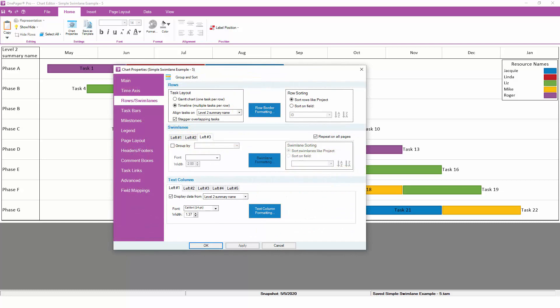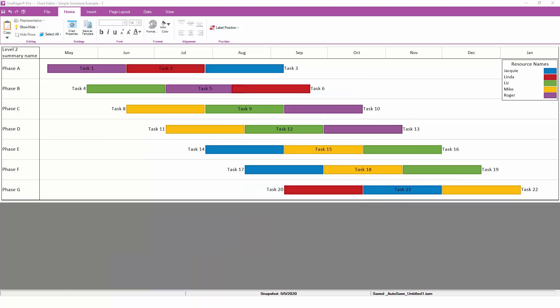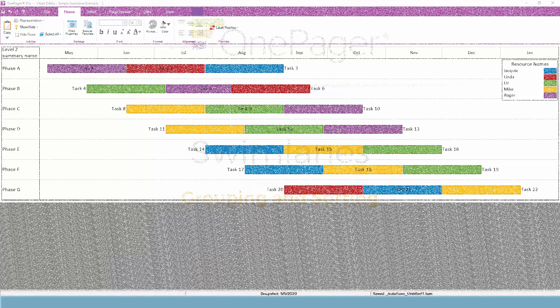When creating a timeline layout, OnePager lets you either allow or avoid overlap. If we choose not to stagger overlapping tasks instead, OnePager will ignore the fact that some of these tasks are scheduled at the same time, and will place them all in one row, no matter what.